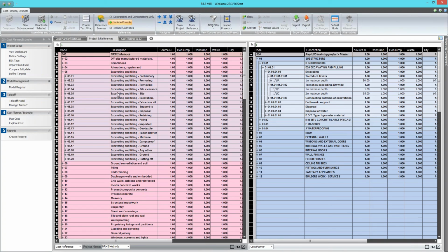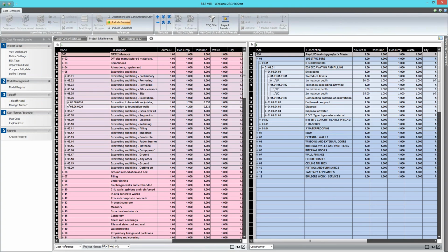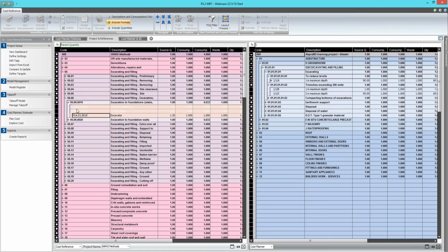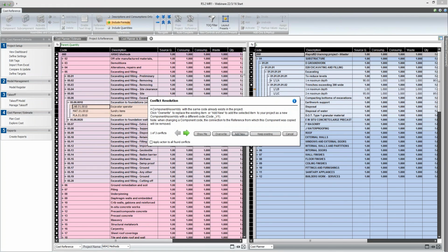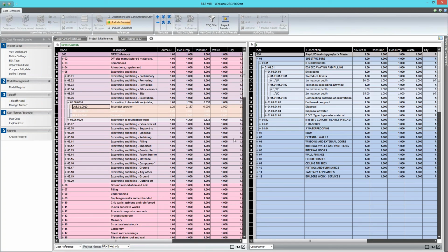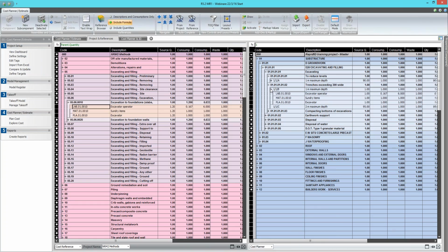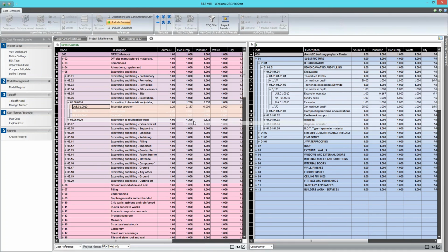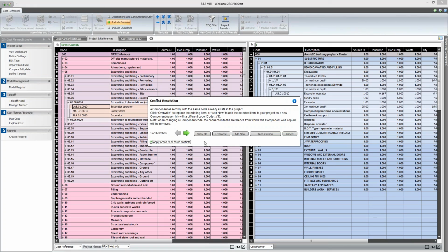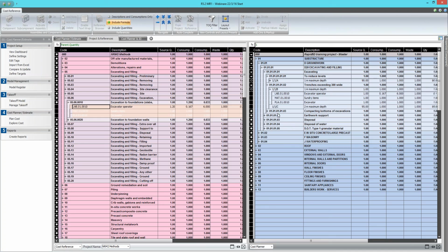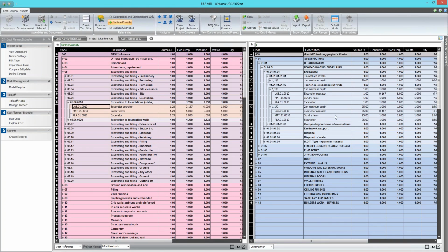And let's say I'll go to these trenches, so I will come down to my excavation, and I might take this excavation build-up and drop it into the relevant place. Just select. Inside here, we now have a labour, plant and material build-up, and I can drag the same build-up. The reason I'm having to overwrite is because the codes already exist in the cost plan on the right, so I just select overwrite again, and now I have that same build-up inside.